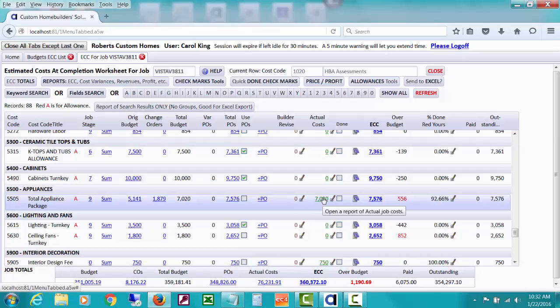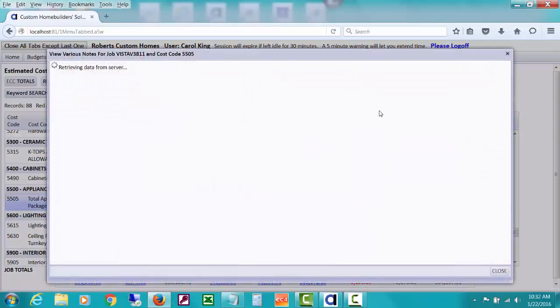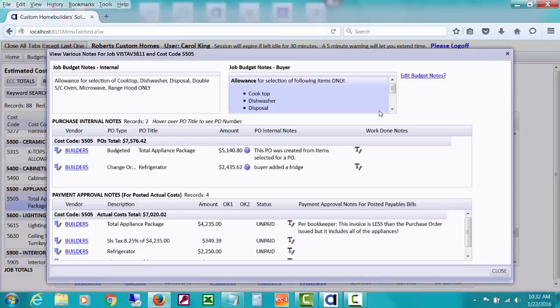But notice how we have actual cost posted of $7,020, but we have POs out there for $7,576. So right now our estimated cost at completion is sitting at $7,576. But let's use these little notes and see if we see anything about this. We're looking and we say, well, $7,000 sounds like most of the costs of the appliances. You can see that the PO that we issued was created from some items that we entered, and perhaps we entered something even sort of wrong, or we talked to them later and we got a lower price on something. So when they sent the bill, which is these two lines, the bill plus the sales tax,